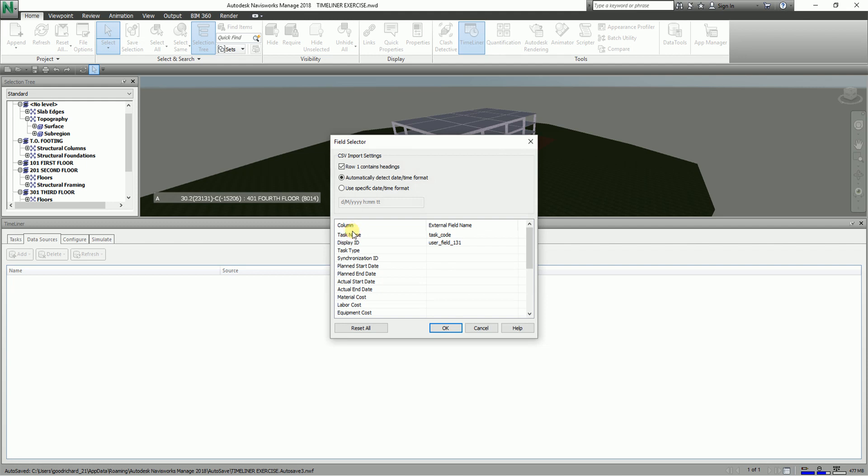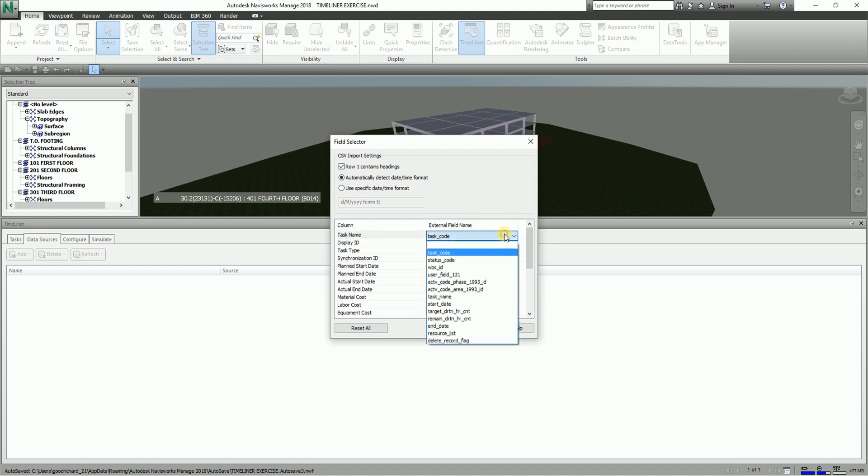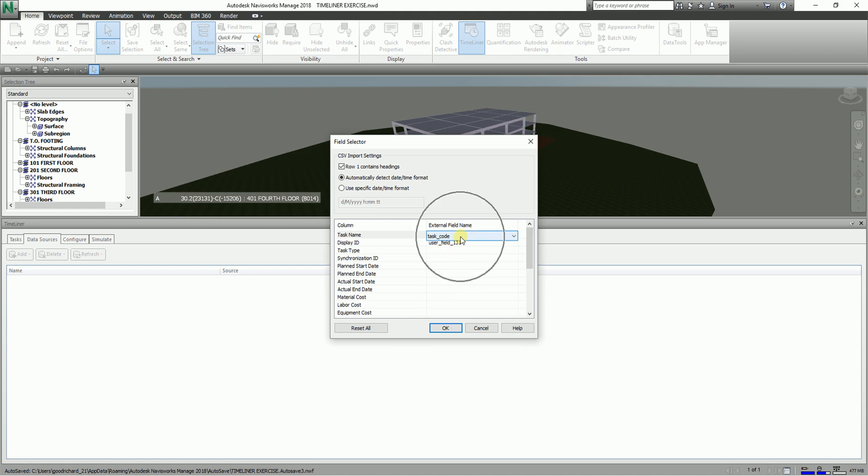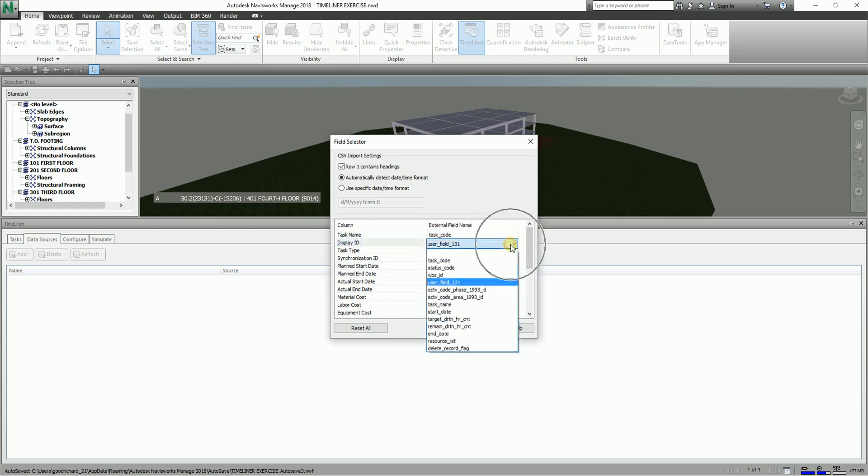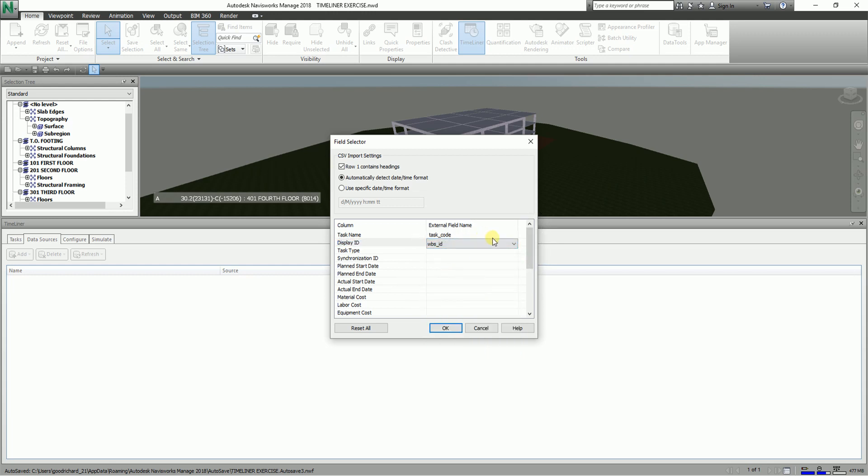After that you need to specify the field selector. Like for example for the task name, you need to add here the external field name. So I already selected this a while ago so I selected this one, and also the display ID - so instead of that I'll just use this one WBS ID.